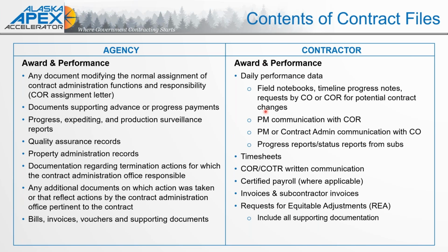All right, continuing that list of files, we're going to gather any of that daily performance data, those field notebooks, any communication between the project manager and the contracting officer representative, or any communication between the project manager or your business and that contract officer. And of course, those progress reports, status reports from subcontractors. Anything that you are adding to your package, adding as part of that invoice and submittal documentation, make sure that you're gathering that information from all levels of that contract activity.